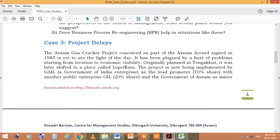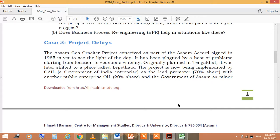The third case is Project Delays. There are resource problems and other issues that cause project delays. The Assam gas cracker project, conceived as part of the Assam Accord signed in 1985, is yet to see the light of day. It has been plagued by a host of problems starting with location and economic viability. Originally planned at Tangangat, it was later shifted to a place called Lepetkata. This project is now being implemented by GAIL, a Government of India enterprise, as lead promoter with a 70% share, along with another public enterprise, OIL, with a 20% share, and the Government of Assam as a minor partner.